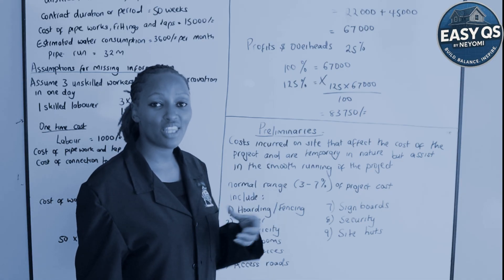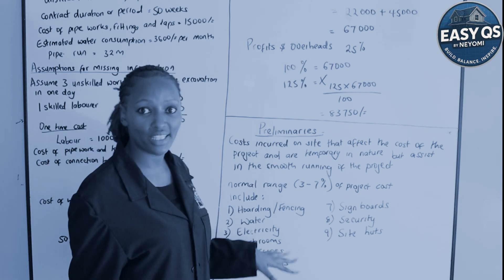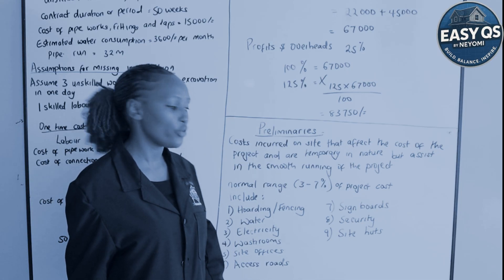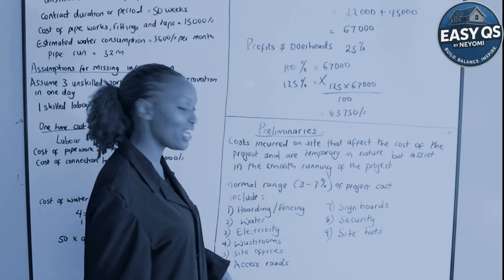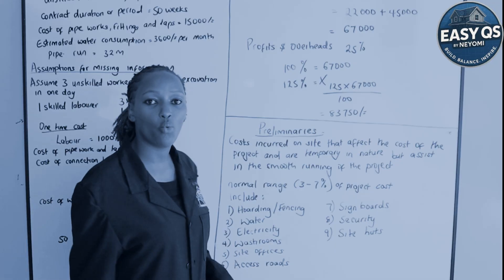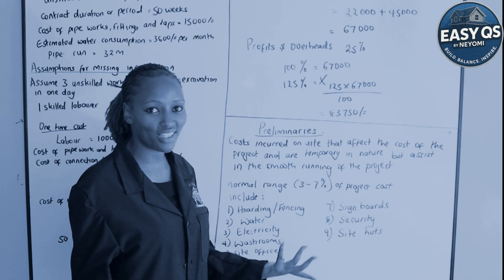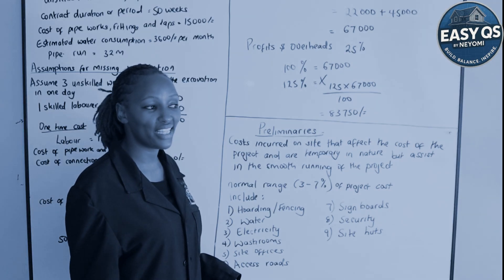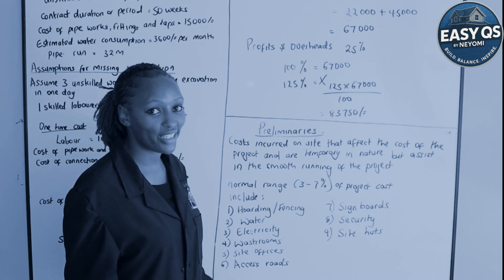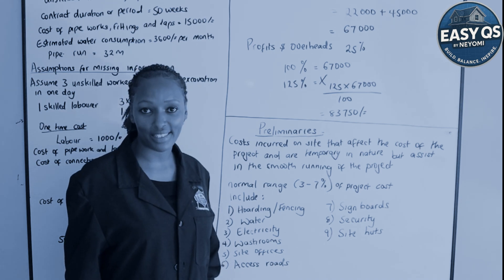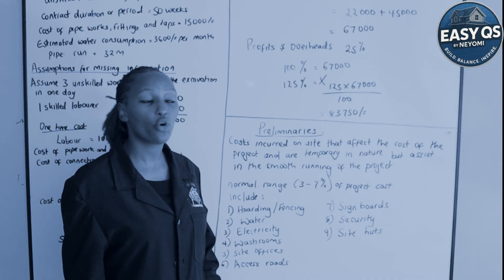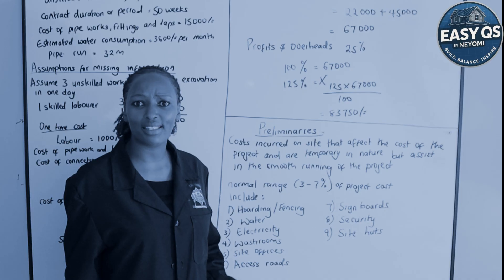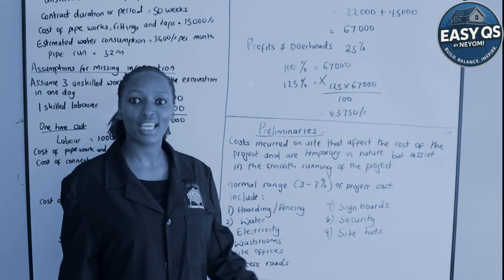Preliminaries include: first, hoarding or fencing — the fence you put on site. Second, water — the connection of water, which is what we shall be calculating today as our first example. Third, electricity — connecting it and paying electricity bills. Fourth, washrooms — you have to excavate for pit latrines and construct them, or connect to the sewer line. Fifth, site offices — these must be constructed for the people who will occupy them.